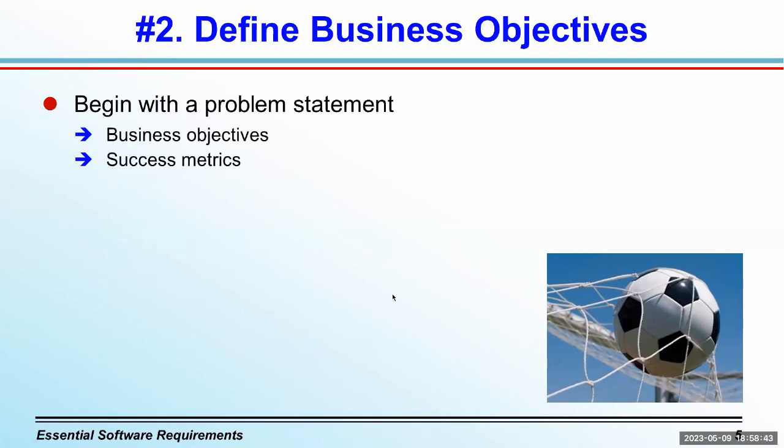So these are business-oriented requirements, which can ultimately lead to defining a solution concept that you're confident will satisfy those business objectives, along with the scope and limitations that bound the solution. It's very helpful to define not just what the solution will do, but also what it won't do. One of my consulting clients did a really good job of this once. They were in New Zealand, actually, and they were building this website to support a national sports team. And they had a very nice list of exclusions, things that someone might expect they could do at this website, but were not going to be part of the solution. And I think drawing those boundaries is really important.